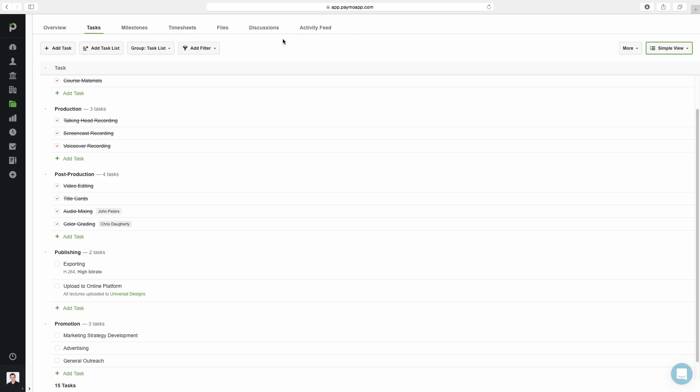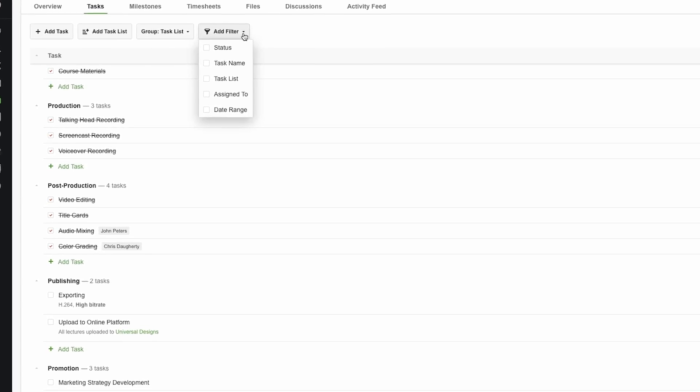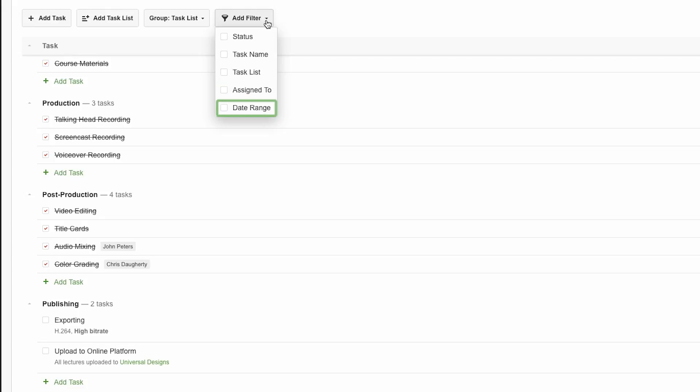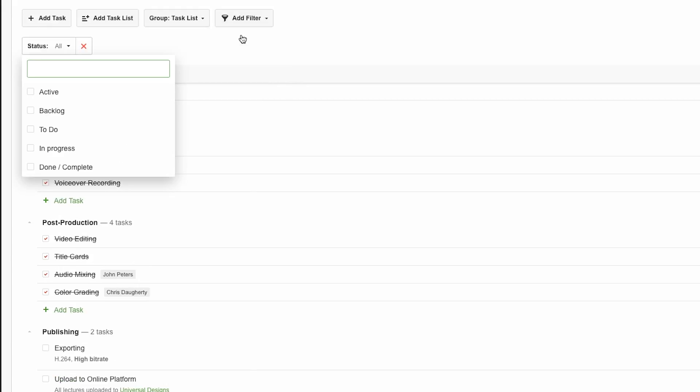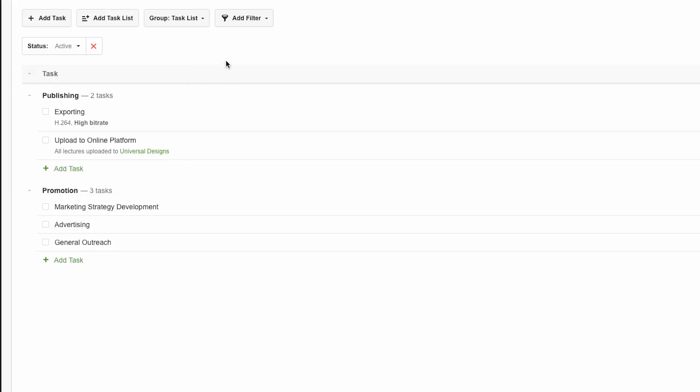By using the add filter menu, you can filter out certain tasks from the display and just focus on tasks with a particular status, task name, task list, person they're assigned to, or date range. For example, if I want to show only tasks that are active and hide the ones that have been completed already, I can choose status from the add filter menu and select active. Now, only active tasks are displayed.